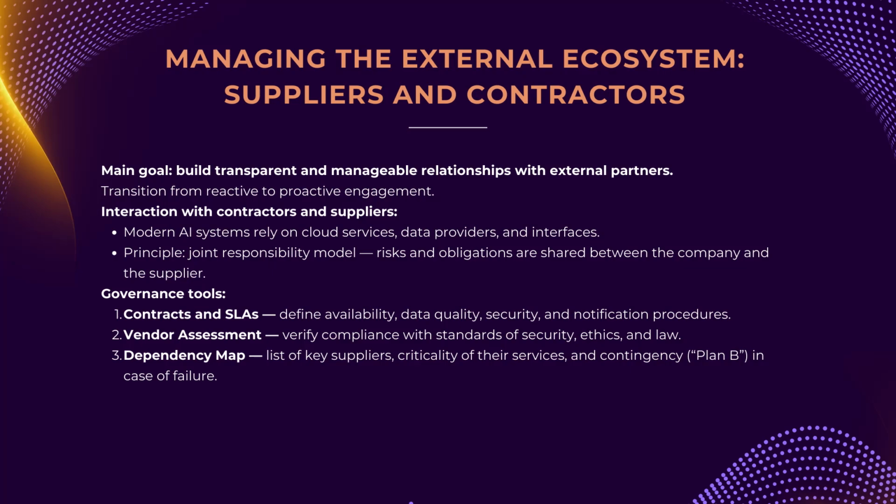Engagement with contractors and suppliers. Modern AI systems depend on external services: cloud providers, data suppliers, and interface providers. Here it is important to understand the shared responsibility model. Risks and duties are distributed between the company and its vendors. Governance tools include contracts and service level agreements, SLAs. Specify not only availability, but also data quality, security, and notification procedures.